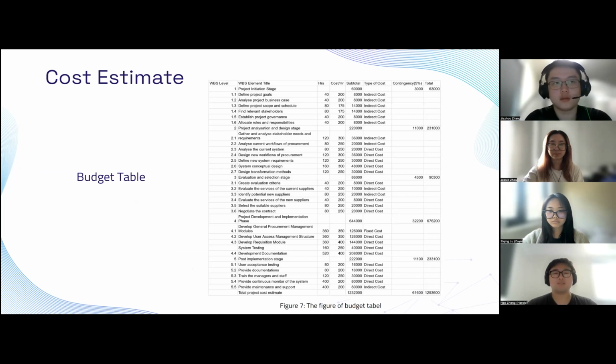In our project, thorough cost estimations are significant. This ensures the achievement of our project goals and clarity in fund allocation and usage to all involved. We've adopted the bottom-up estimation method. Costs for each work package from the WBS are determined first. Then we aggregate them for phase and overall project cost. We've included labor, material, direct and indirect costs in our estimates.